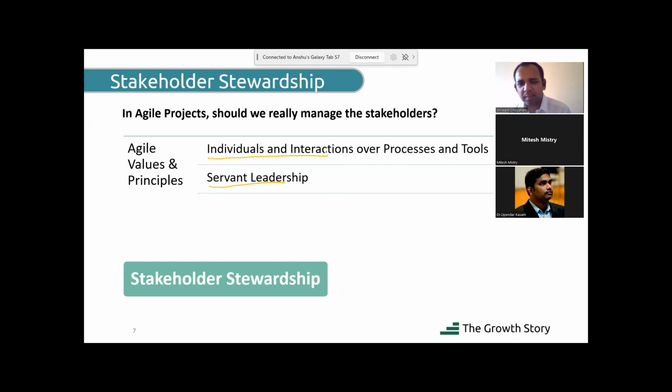Okay, there are 2-3 ways. Internally, like a daily stand-up call and a weekly call internally, the product owner and team members. Then after that, we have a bi-weekly call with the middle level management, project sponsor and other people. Then monthly we have a steering committee, and our CEO, sometimes CTO, and the vendor vice president or CEO will present, and they'll chalk out the plan, what are the bottlenecks, and how we can extend help together to move to the next level.